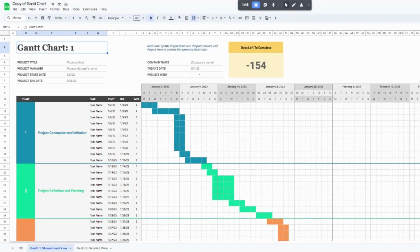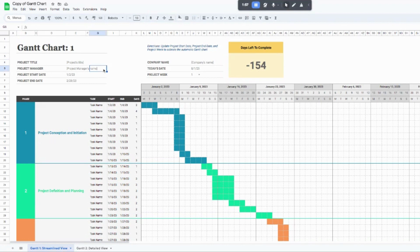Jumping back to the streamlined view, at the top feel free to rename it. You can type in a project title and your project manager's name. For the project start date, just make sure that this is the earliest date that any of your tasks below start — either equal to your earliest task or even before that. Your project end date is going to be the opposite: the last day that any task would end for the project.